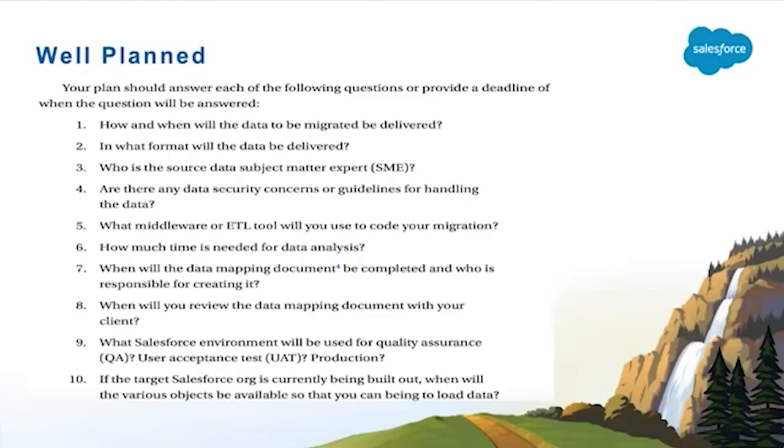It is like changing the tire while the vehicle itself is running. How many days to switch off the system is the best example of well planning. For example, you may have a large volume of data involved in the migration. Then, as part of the planning stage itself, you should know how long the production downtime is going to be, have a common agreement with the business, and set the expectations clearly to your stakeholders. Even production deployment and support should be addressed as part of the plan itself.